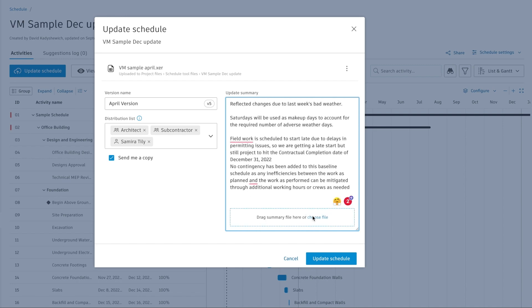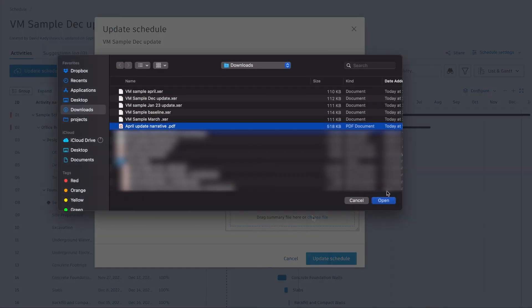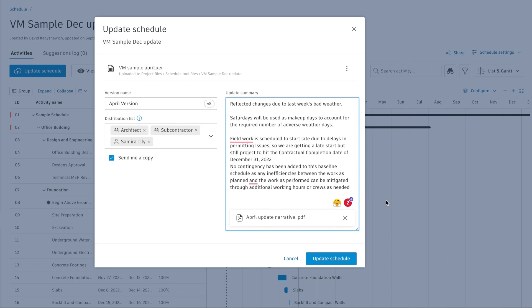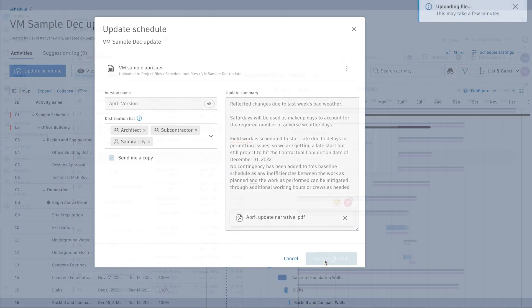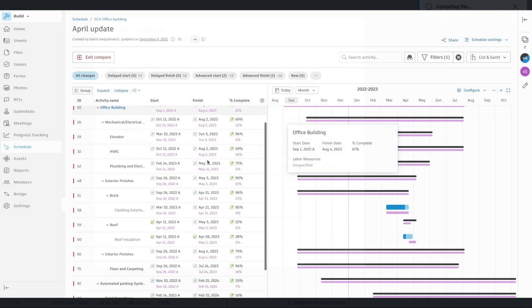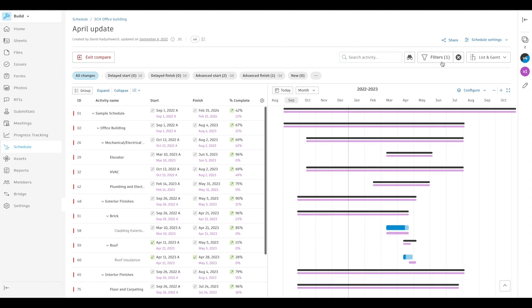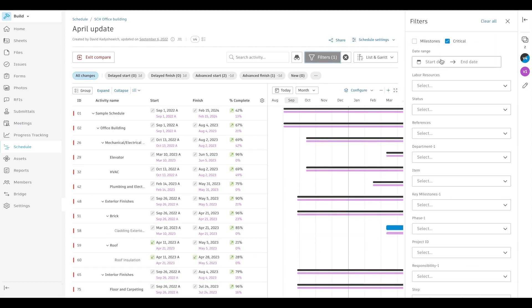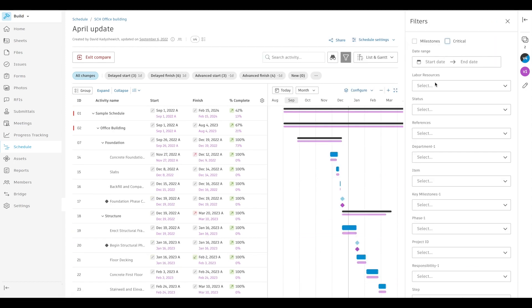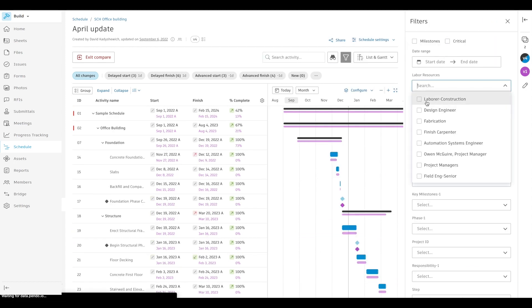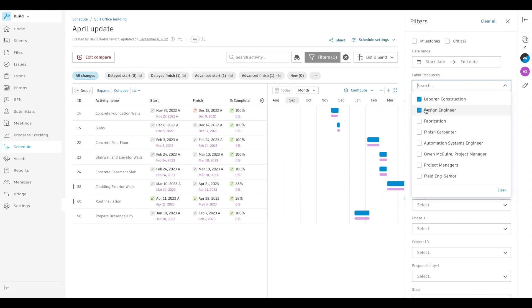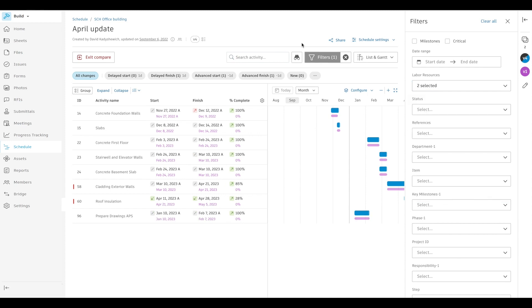schedule managers can add a narrative when uploading a new version and notify key stakeholders while maintaining robust version history. Teams can also quickly see changes between different versions using the schedule compare feature to identify and address changes in a timely manner.